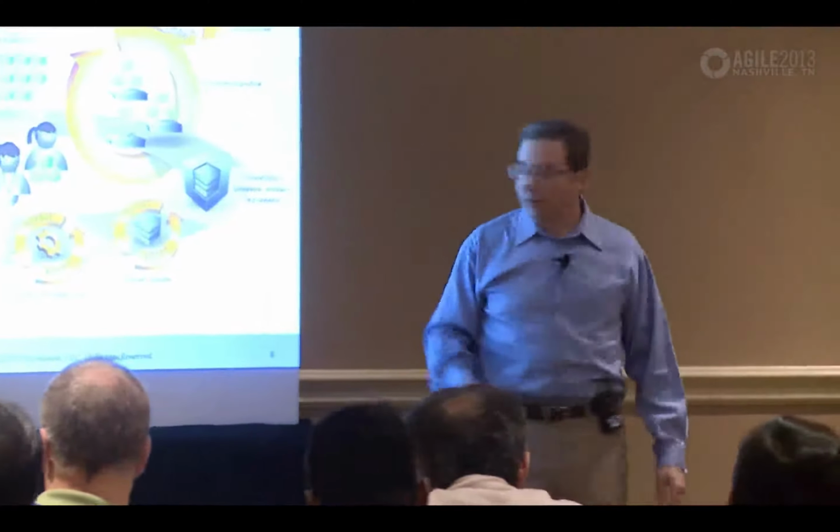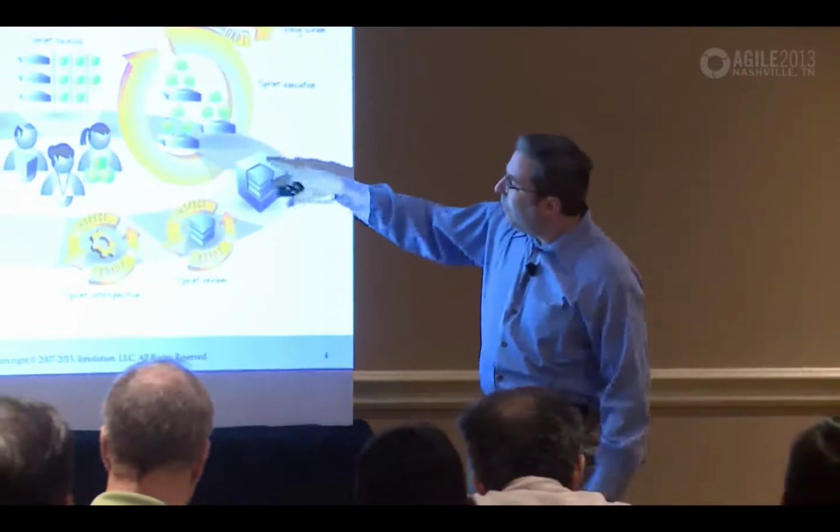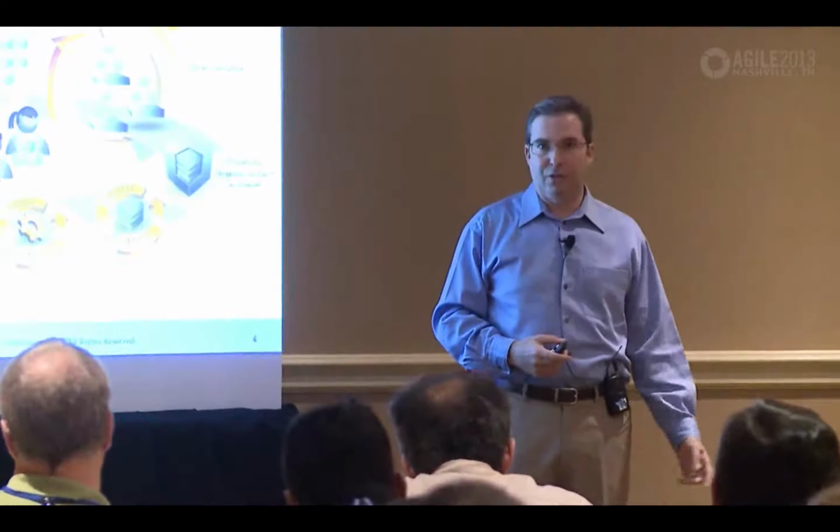Every day we do a daily scrum. The goal, produce a potentially shippable product increment. We weren't trying to produce the entire blue cube in this sprint. We were just trying to produce a piece of it. Couldn't produce the whole thing, it was too big. But the piece that we produced should be done to some reasonable definition of done.